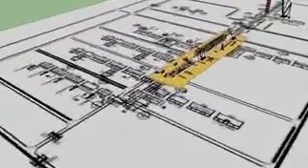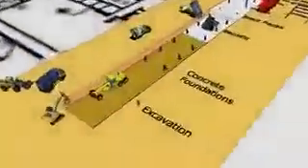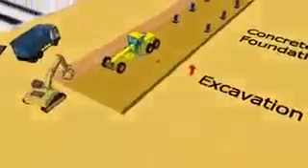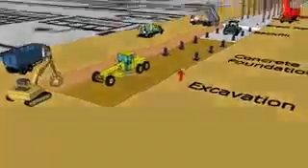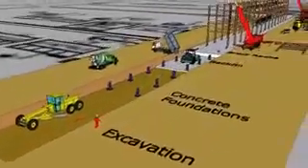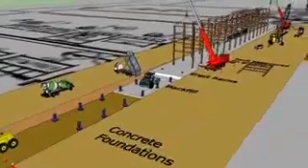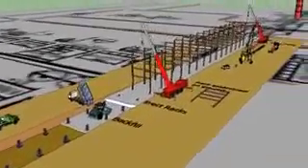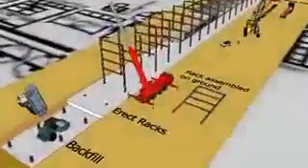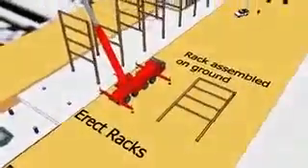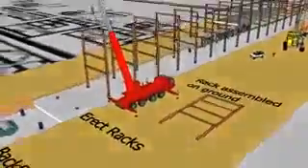Pipe racks in gas processing plants. The pipe racks carry pipes and cables. The pipes contain gas and liquids that are transported to and from the different processes. Pipes are welded together and inserted on rollers into the pipe rack. A temporary hanging scaffold is placed below each work level as a platform.